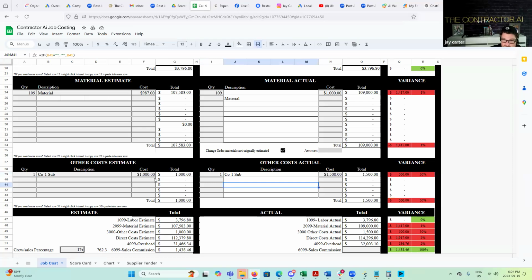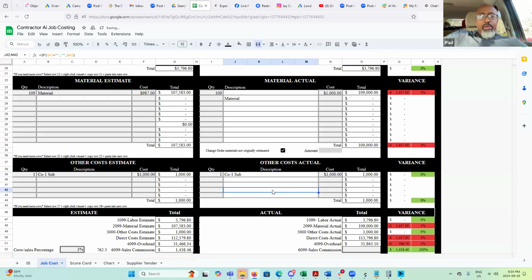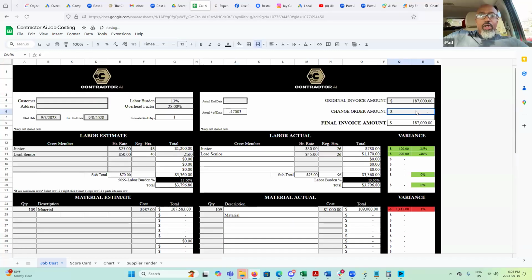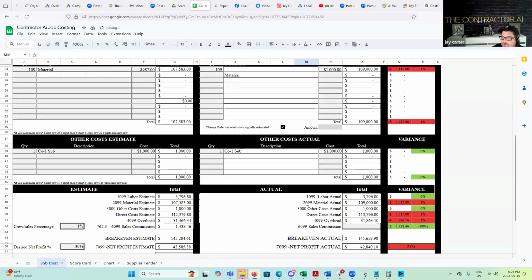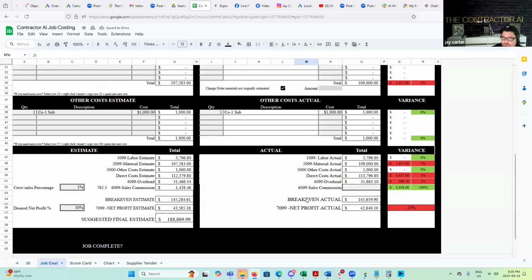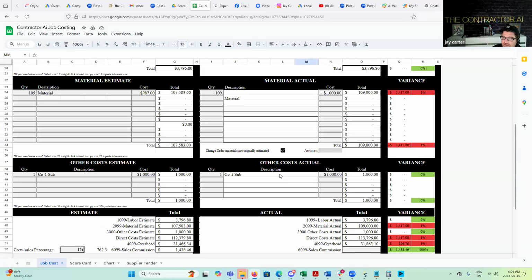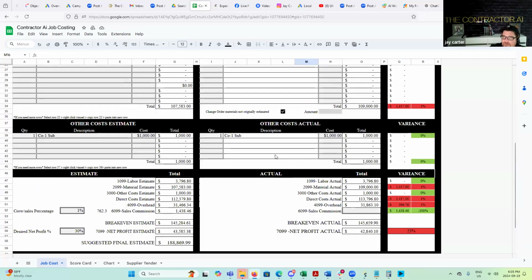Oh, opposite, sorry. His cost is 1,000 and I'm going to charge 1,500. Okay. And the customer pays you that 1,500 right there on the spot. Yep, right there on the spot, because you don't want to leave it to the end. They won't pay, they'll argue and dispute it. So my change order goes in there, I've increased that volume, and I made my $500.